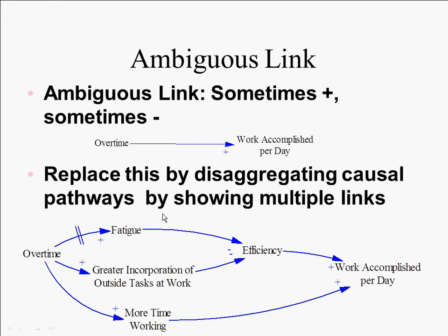Because the problem is, if you're working lots of extra hours in a fatigued way, you may be, even if you're fairly efficient, chunking through the work, if you're introducing bugs, logical reasoning errors because you're too tired to think about them, or if you're slower in debugging, this can really lower the amount of work you accomplish per day. And what's worse, ladies and gentlemen, and this is key, there's actually some wonderful work here applying system dynamics to software development that focuses on this issue.